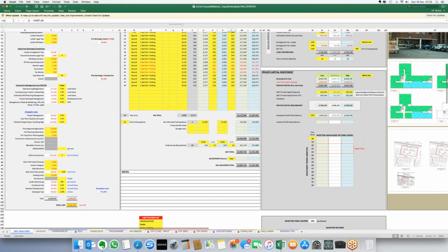Okay, so we've got our summary here. So £10.510 million to £11 million, that's GDV. But let's look at this development. Gross development value is about all the values. When we sell everything and hand the keys over and we walk away from this development for good, what is the total amount of money that we can establish within this scheme? So we've looked at parking spaces.